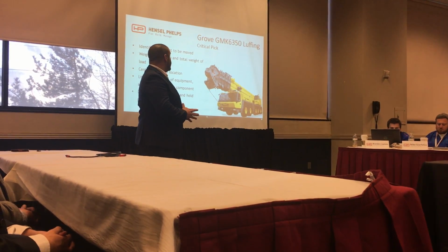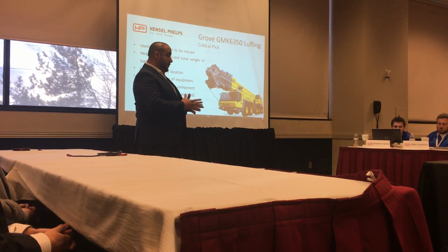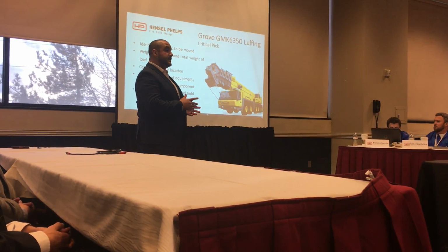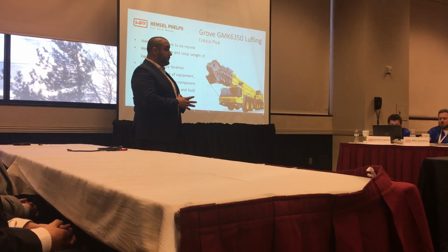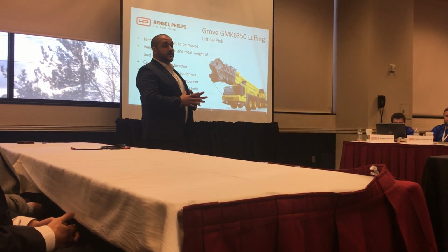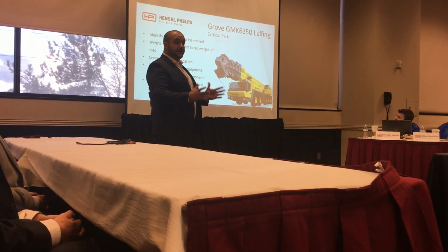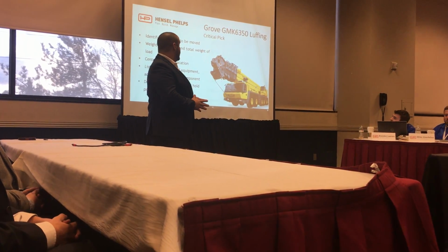Like I mentioned, we will be utilizing a crane, and with the critical lift plan, we will implement a safety officer on site for that day and the days of any of the CT and MRI scans. We will have 2 weeks to review the critical lift plan. We will go over the weights of the rigging equipment, how often they'll stop, their checkpoints, their stop points to check their gauges, make sure they're still in equilibrium and they're not in danger of tipping over or losing the load.